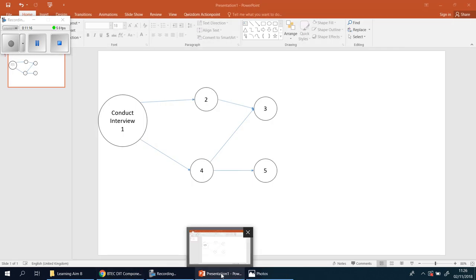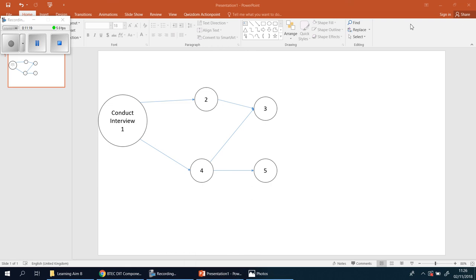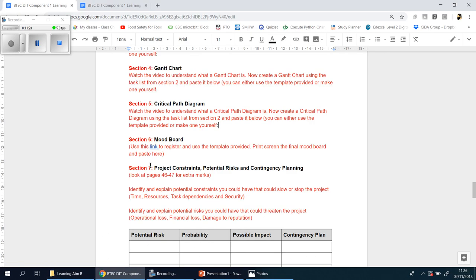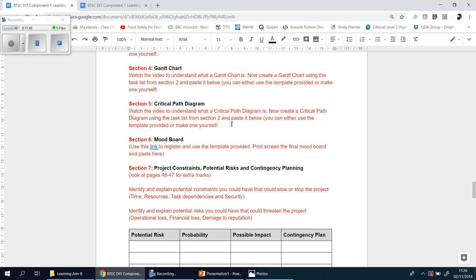Once you've got this, you print screen and paste it into that section. For the higher marks, explain in a couple of sentences what the longest path is, how long you think you'll take to complete the whole project, and whether that's within the time frame the manager asked for. Remind yourself—what did the manager say? Four weeks. So after you've done the critical path, can you do it in four weeks, yes or no? That brings us to the end of this video. In the next one we're going to talk about mood boards.